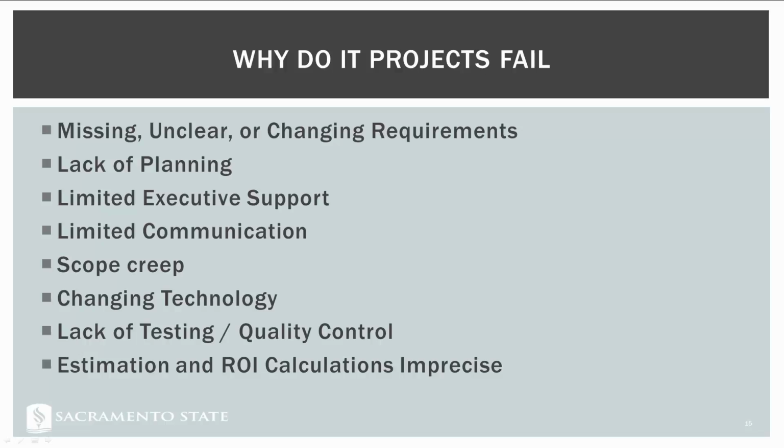And that's when projects tend to really fail, when the scope gets really, really big really quickly, and we just can't support it with the budget and with the time frame that we originally were planning on. The next one is changing technology.